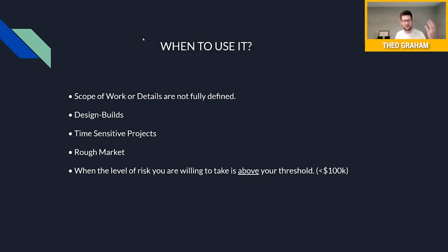On a fixed price job, there is a way to get around that, and you need to: it's called a price escalation clause. We can send you that if you need it, but you've got to be monitoring it, and unless you're sitting there refreshing the rates of lumber, that can slip through the cracks. With cost plus, our clients just pay the cost when we buy it, and then they pay the plus on top of it, which is predefined and agreed to. So in rough times and rough terrains, it sure can save you some grief. The last one is probably the most important one.